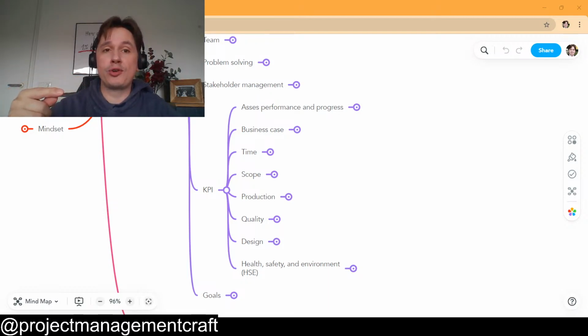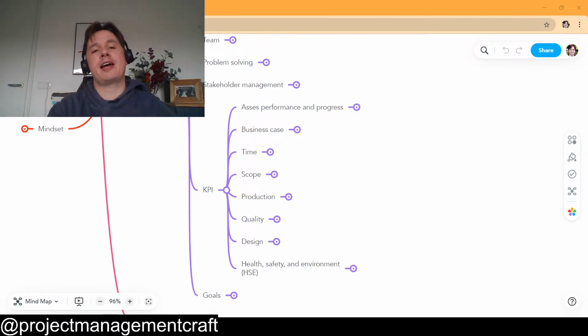You set a culture that everybody wants to release drawings. So they were releasing a lot of drawings, but those drawings had a customer or an engineering reviewer who had to review the drawing technically to say okay, that's okay, let's proceed with that. And if you want to issue something very fast, likely what they were doing was compromising the quality, so they would gain a lot of comments.